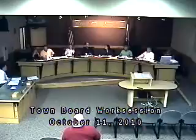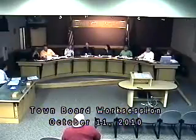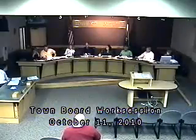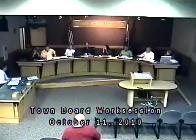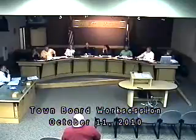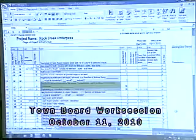When there are items in the budget, do you spend money to actually do the design phase of it? Mm-hmm. You do. So once it's in the budget, whether it's been approved or not, you do spend it. And if it's over the manager's approval threshold, $25,000, that contract for design work is going to come to the board.